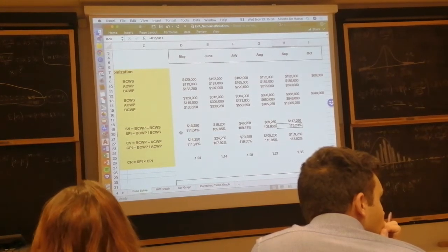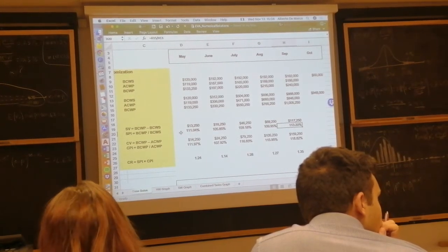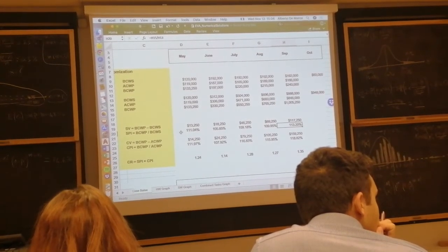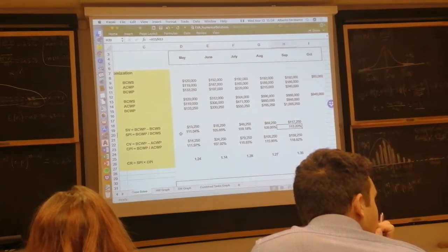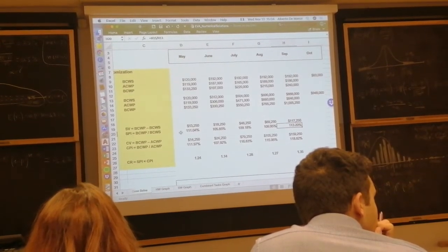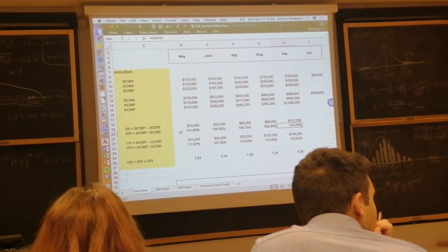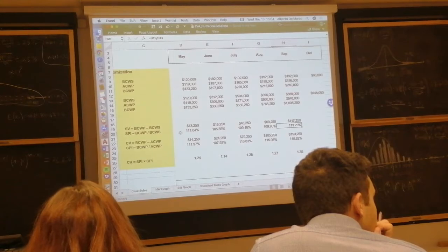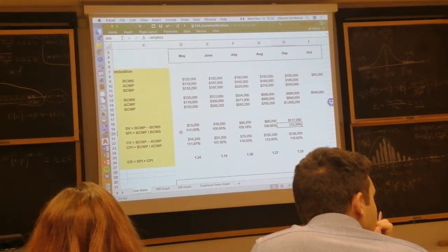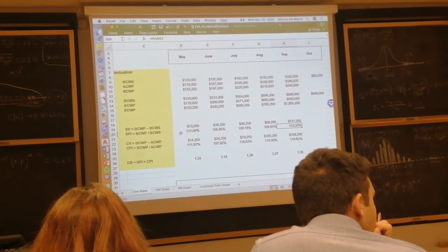Because we need to understand that project monitoring becomes reliable as data become available. And the more the progress, the better the accuracy. It can be demonstrated that when the project reaches 20% complete on the physical progress, then your monitoring data are enough for you to make reliable linear estimates at completion.